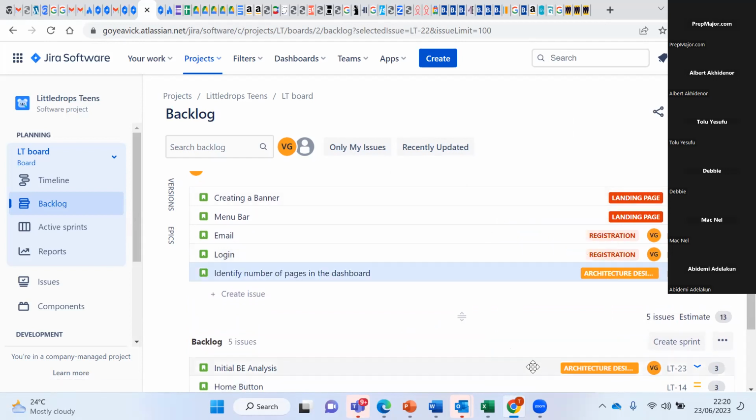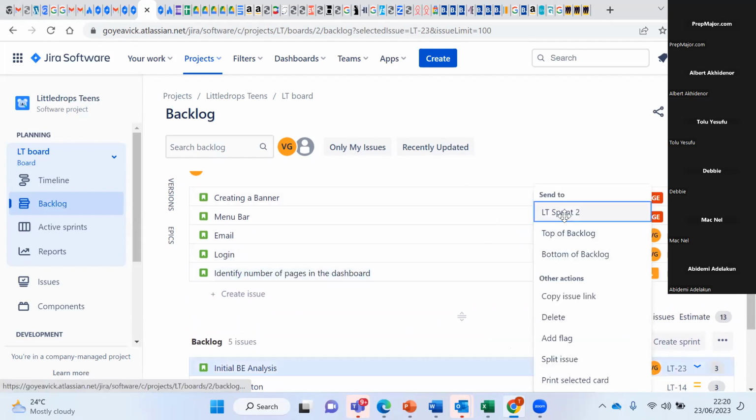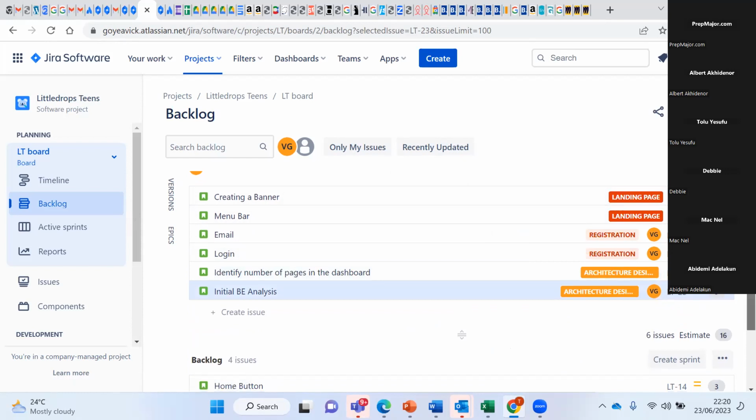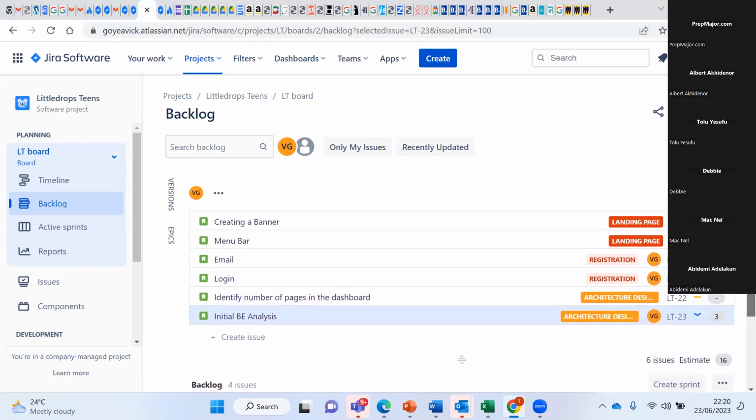So let's say that maybe during sprint planning, we've done all of these. We've said these are the tickets we want to prioritize and all of that. And then the Scrum Master says, actually, based on all the estimations, we can't take everything in. So based on priority, what is of lesser priority that we can bring out before we start the sprint?